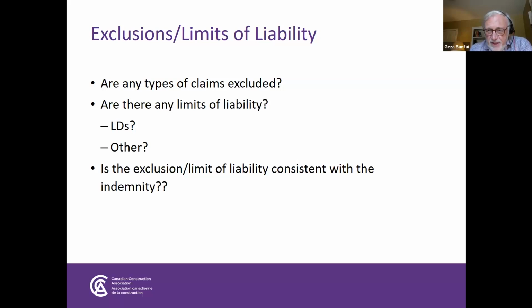When reading the contract, you're going to have the indemnity clause, and you're going to have probably an exclusion clause or a limit of liability clause somewhere in the contract. Read the two of them together to make sure that they actually work together.